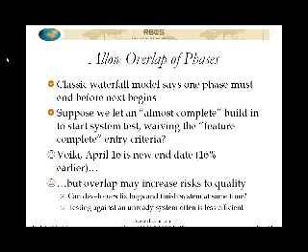What happens when you're finding bugs in the core features, because that's what you're going to start testing, core features, presumably those are the more important features. You're finding bugs in those during that 2-week period where developers are still finishing development.